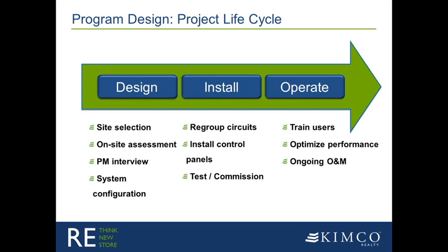We can break them down to 3 phases: design, installation, and operation. And I want to just highlight a couple of sub-bullets under each one of those. With design, we've really found that the quality of the site assessment greatly improves the rest of the project. And so we spend a half a day to a day, the electrical subcontractor, not only doing the survey that will provide the mapping of each fixture to its associated circuit, but also maintenance items and other things that we may find and want to be aware of.